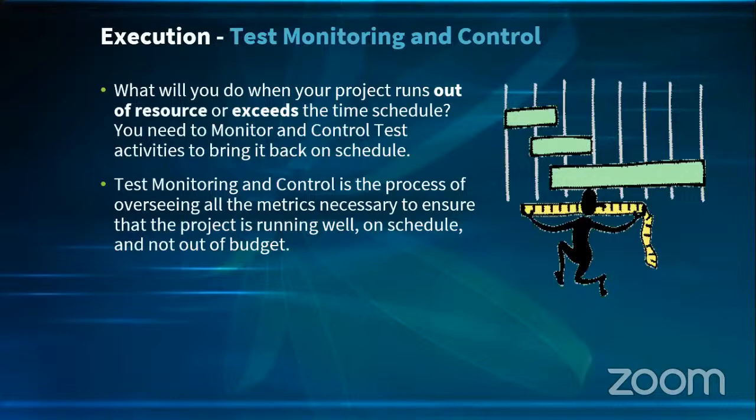Day 3. Meanwhile, in your own schedule that you have done previously, you have already estimated by day 1, once we have the test environment, we can hit the ground running and start testing. But all that has not happened until day 5. So we know we are 5 days behind. So we need to let people know.